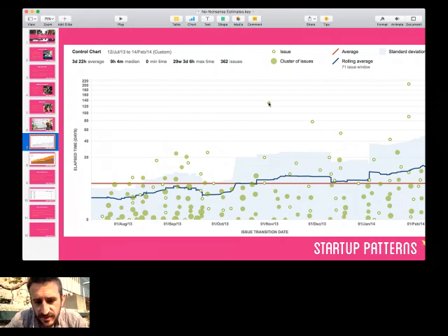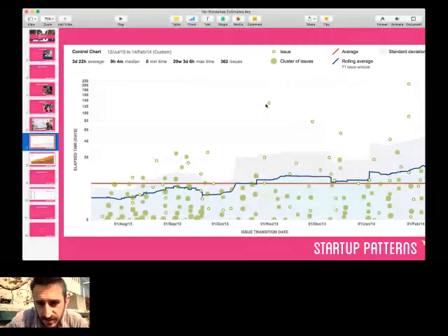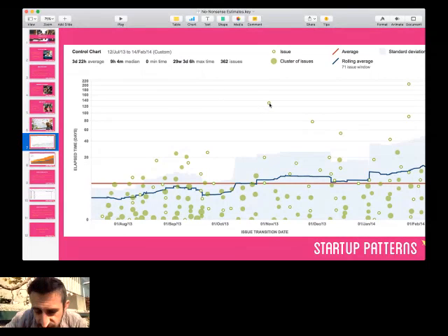That could very well have been a feature that was predicted to be easy to do. So its actual work time, if we were just using Scrum story points, for example, that could end up being a 3. Maybe it was very simple relative to other features. But for some reason, its cycle time was really, really long. It looks like it took 130 days to get this one done.